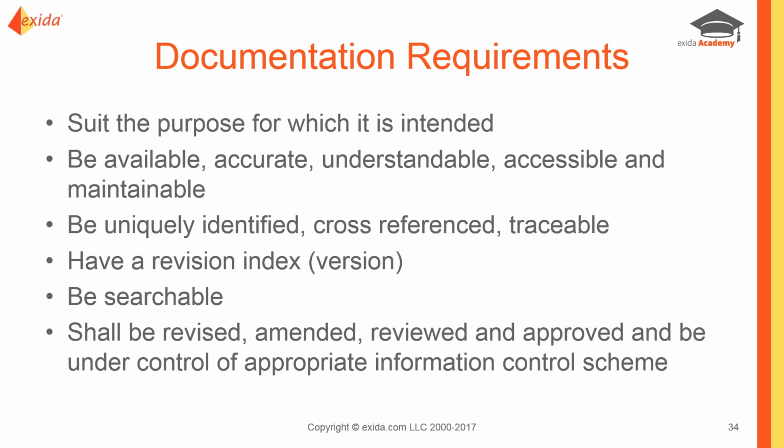When we get to the process safety plan, you'll see how we can actually cross-reference some of those documents so we see where they fit within the life cycle and can provide that traceability. It is important that the documents be searchable. Some of these can get quite large, and if we just simply have a non-searchable scan, then it's a lot less friendly and a lot more cumbersome information. So when we're working with vendors and you're scoping, require searchable documents.